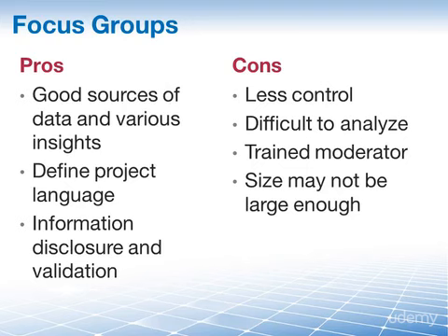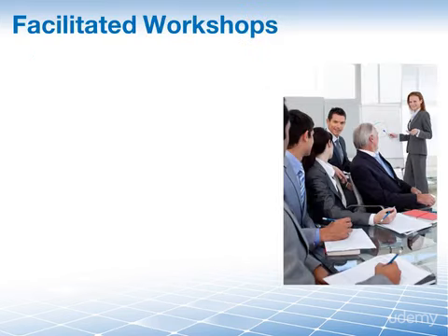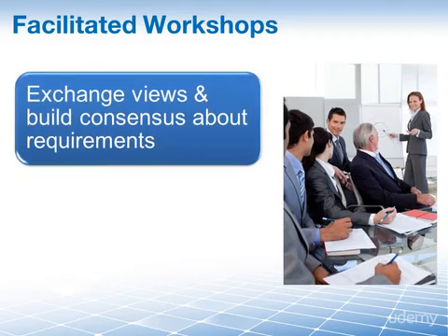for the project. We're moving on to facilitated workshops for stakeholders, which provide a structured forum to discuss and reach agreements about project requirements with inputs from key areas of the business and subject matter experts. During these facilitated workshops, important stakeholders assemble to exchange views and build stakeholder consensus about project requirements.